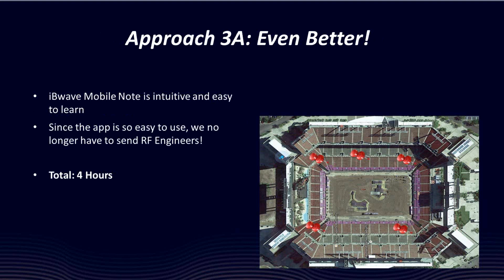And that benefit is we have been using extensive RF engineering people to go out and do the site walks. In some cases, we were flying these individuals from our central office to the stadiums and the buildings that were remote. So not only were our best resources tied up on these walks, but it was very expensive to move these resources around.